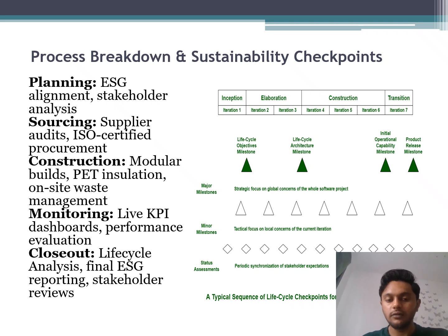And the last one is closeout. In closeout, we will go through the life cycle analysis, final ESG reporting, and stakeholder reviews. We will gain feedback from the community, so we get an idea of whether we are doing right or wrong.